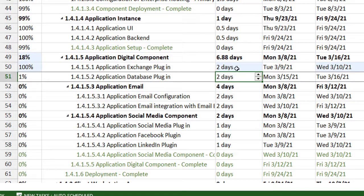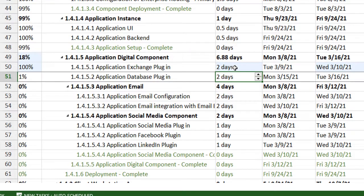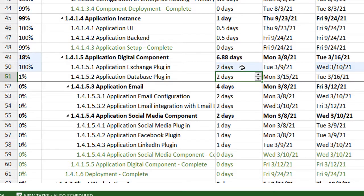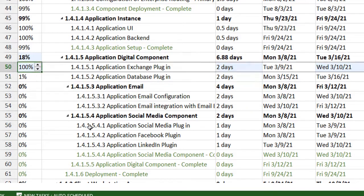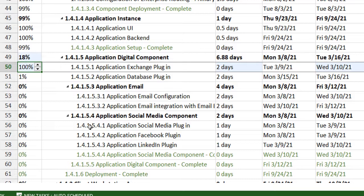That will make a few changes in the project plan automatically by default. Since my project plan is set on auto calculate, as soon as I reduce the days to two days, it automatically adjusts the percentage to 100%. So the task was at 50% in four days. Based on that, the moment I reduce the duration to two days, Microsoft Project increases the percentage by the same amount that it was set to previously.